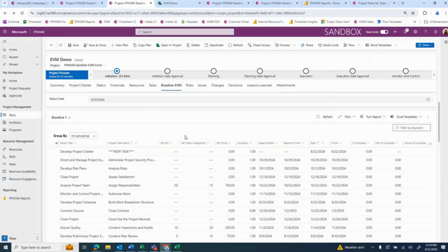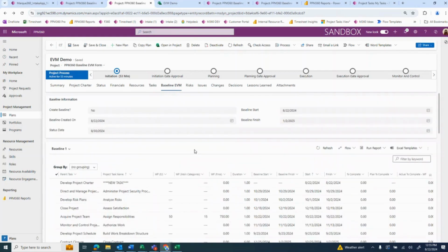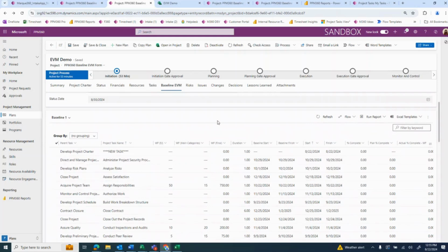So what I would recommend for that is not reading it necessarily to the tasks table here, but having this baseline tracking. So there would be a workflow or integration that would bring in, let's say, task name. I'm guessing on the Jira side, it would be the same task name here. And then once that task is completed, it would run on a flow that would show the actual completed. And then you would obviously measure initial effort here as well. So then it would still be able to give you that notification of a task planned for 5 hours actually was logged for 20.